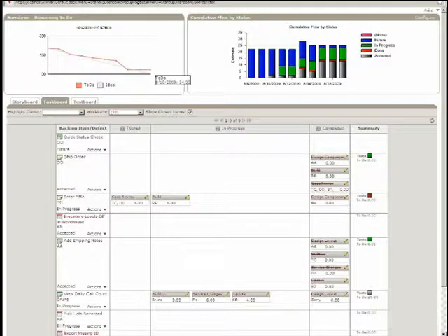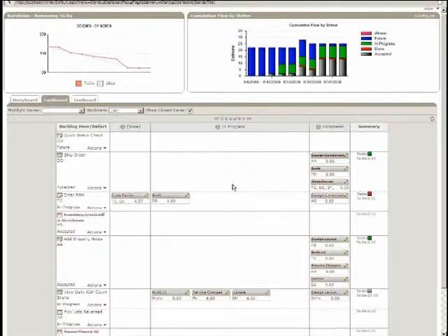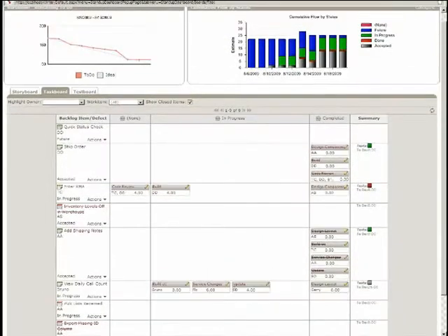Remember that to-do or that detailed estimate that we were putting in. That's what's going to determine what's remaining to do in our sprint, because we're concerned about how many hours we have left to work and what tasks are remaining to complete. So we see those tasks remaining to complete in our task board. We do see a cumulative flow by status by default in our stand-up dashboard as well.